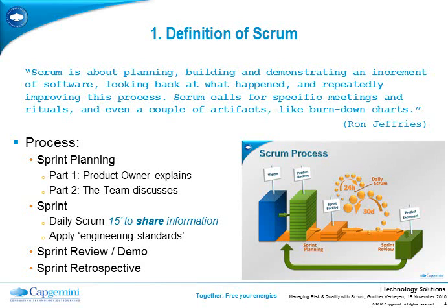Then the sprint starts. A sprint usually lasts from 1 or 2 weeks to 4 weeks. I have a preference still for 4-week sprints because of my context of somewhat larger projects. So during the 30 days sprint, every day again the team meets in a daily scrum. A daily scrum is a short, powerful meeting, time-boxed to max 15 minutes, and it serves only to share information amongst the team, not for management reporting, frightening people or whatever.